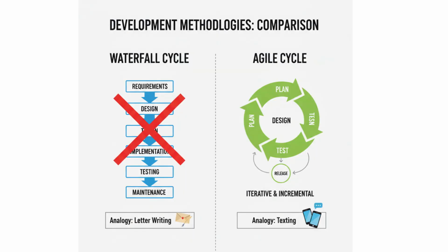Why Agile emerged? In the late 1990s and early 2000s, software projects were failing at alarming rates. Teams realized they needed a new approach, something flexible, collaborative, and customer-driven. In 2001, 17 software leaders gathered in Snowbird, Utah, and created the Agile Manifesto. They wanted to shift focus from rigid processes to people, from paperwork to working results, and from plans to adaptability. This gave birth to Agile, and frameworks like Scrum, Kanban, and XP became the vehicles to make it real.